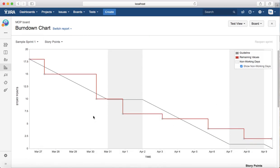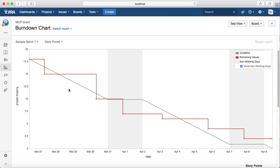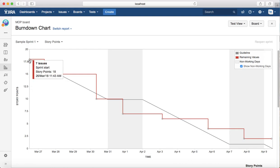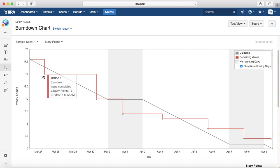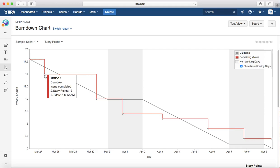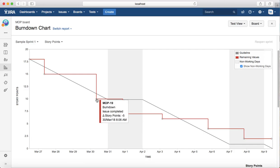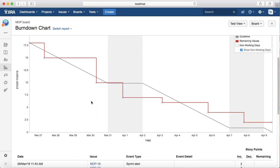As you see, this is a sample sprint that has been completed already. The red line here is the actual progress that has been made for the story points. For example, on the first day of the sprint, the total planned points was 18 points. On the 27th of March, three points were completed, so that came down to 15 points. Then there was no progress until the 28th, 29th, and 30th. On the 30th, five story points were done. It shows you the actual progress or how many story points are being burned on a particular day.